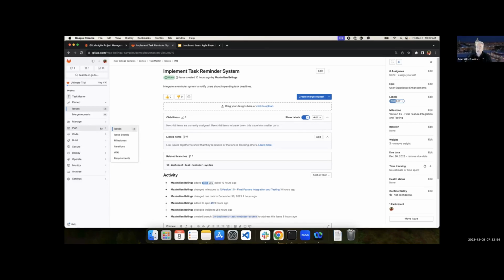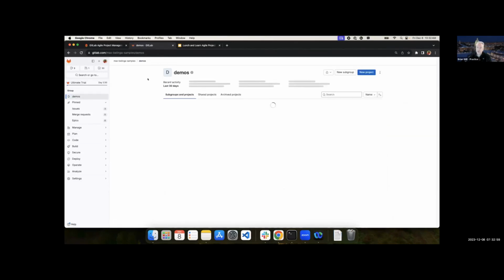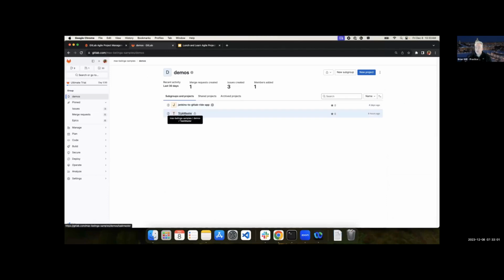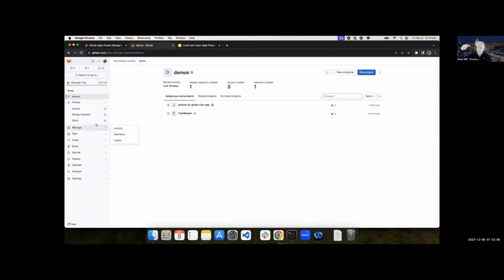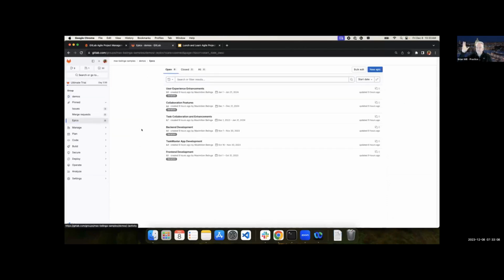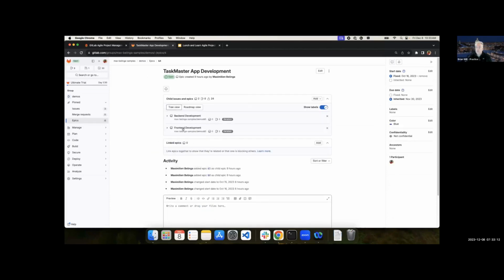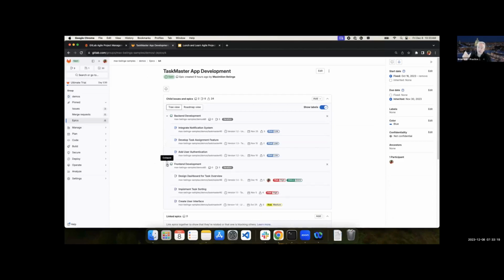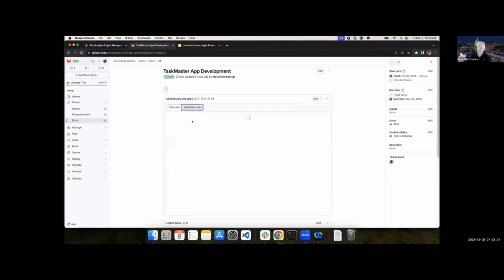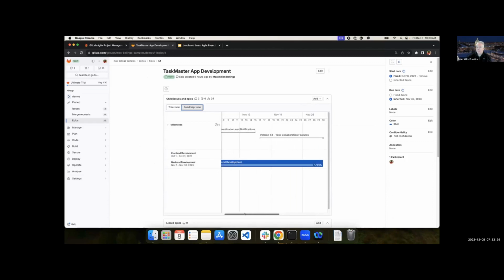So for example, if you have a dependency, issue number 1 has to be done before issue number 2, you would express that as part of the priority. One of the agile principles, whatever you want to call it, is done means done. This is why you organize it into sprints, so you don't get partial credits. If you have a story or an issue that isn't done by the end of the sprint, it moves into the next sprint. You see what I'm saying?